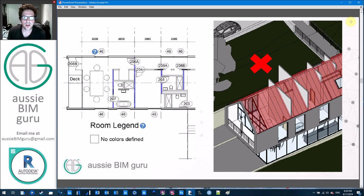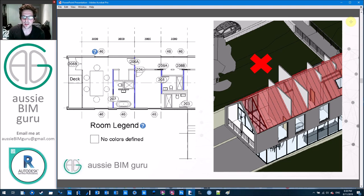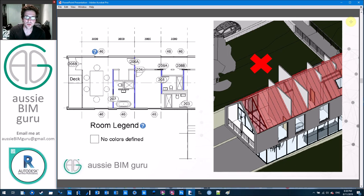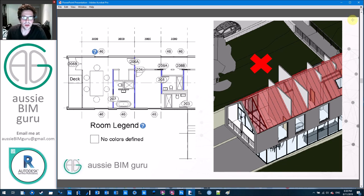Keep in mind that things should be modeled correctly as they would be built in the real world so you can get accurate quantities. If walls are going through the roof, for example, and you went to check a quantity takeoff schedule for paint, you could over-order on the paint required for the project. Usually there are QA measures to stop these things happening in BIM, but be really careful when you model to think about how you're modeling in all dimensions.